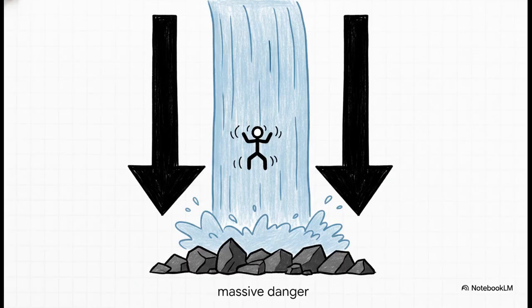But there is a massive danger to the traditionalist approach, and it's this. Swimming against a waterfall is not fun. Because everything is mapped out at the very beginning, you're in big trouble if project expectations suddenly change. Once a stage is completed, there's really no going back. If your project requires continuous testing, or you just don't fully understand the requirements on day one, a rigid waterfall approach is going to be incredibly painful for your team.